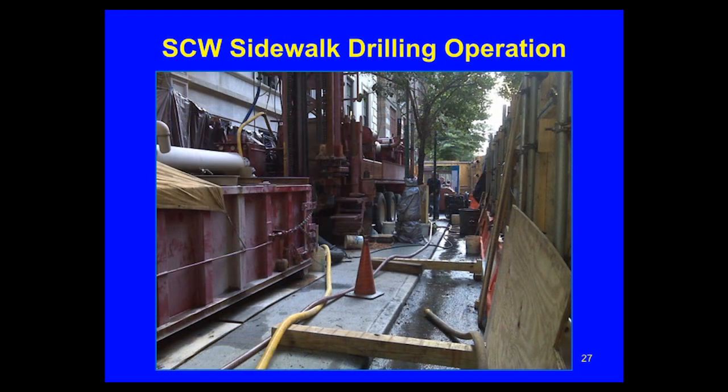I keep on using this advancer. So this is just an example of, imagine pulling all this together in New York City. And in New York City, you need a permit for just about everything. A permit to close the road, to close the sidewalk, to put each piece of equipment on the sidewalk.